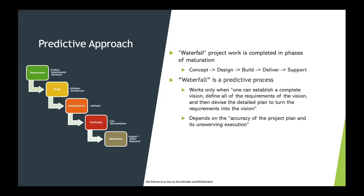Waterfall is a predictive process, which means that it can only be effectively applied when there is very little uncertainty expected as the project is executed. The requirements need to be well understood, as well as the method of achieving them, which must be highly controlled and with minimal variability. Success of a predictive approach depends on the level to which the plan can be adhered to. It must be possible to completely define the requirements before implementing the design, fully implement the design before implementing the software, and fully test the software with minimal discoveries that impact any of the prior phases.